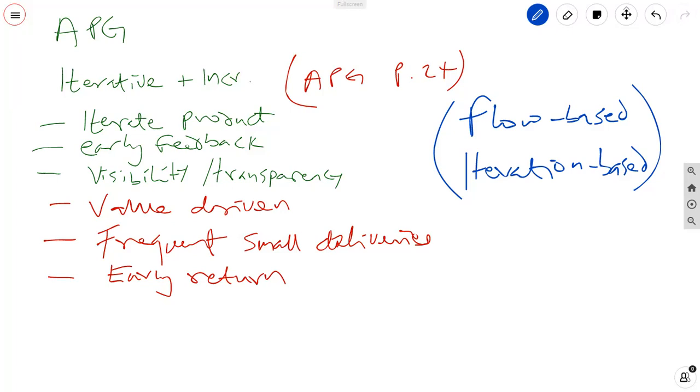Some Agile approaches entail iterations that are 1 to 2 week duration with a demonstration of the accomplishments at the end of each iteration. The project team is very engaged with the planning for each iteration. The project team will determine the scope they can achieve based on a prioritized backlog, estimate the work involved, and work collaboratively through the iteration to develop the scope. So that is pretty much the summary of what we have in the 7th edition.